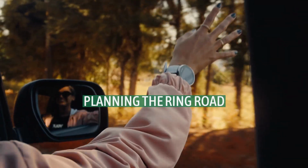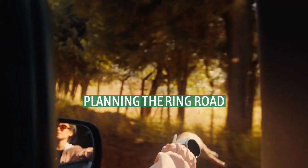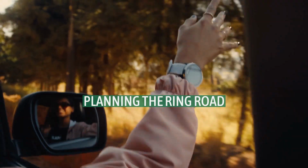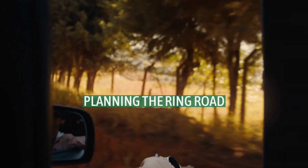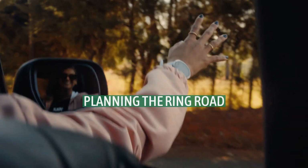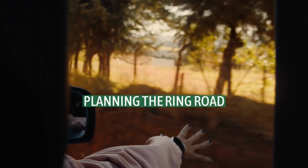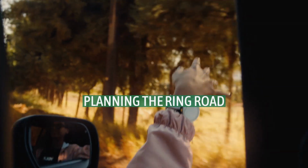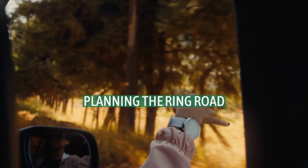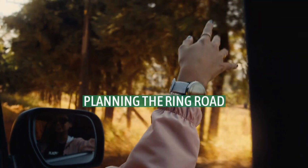Although the plan was agreed and signed off, the council did not begin construction immediately. Funding was limited following the economic hardship of the war, and the council's priority was the rebuilding of bomb-damaged areas in the city centre and completing the precinct, to enable businesses and shops to resume full operation. The city centre work lasted throughout the first half of the 1950s, as the council and businesses had to negotiate the use of the space and conduct lengthy planning applications, as well as completing the construction work.